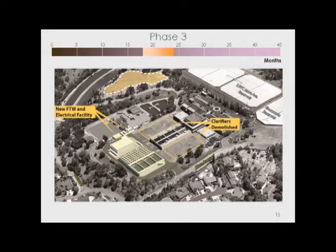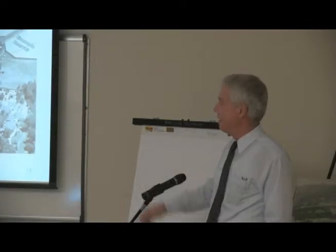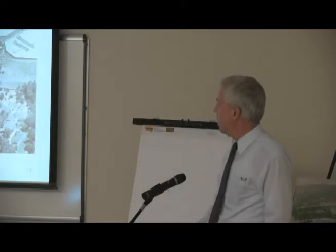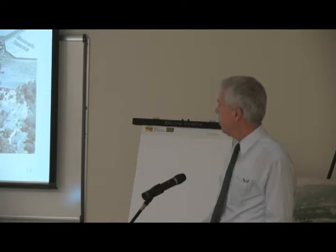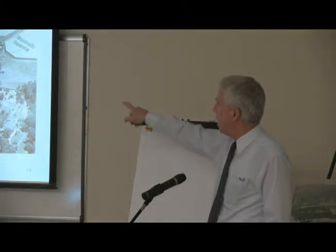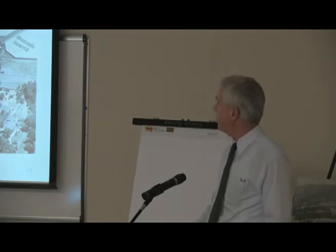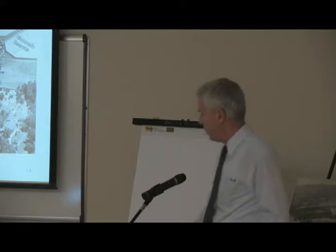So now we've got the new ozone contactor and the flock sed basins built, so we can take the clarifiers offline. And taking them offline is not like unplugging them. We're gonna flatten them. They're gonna go away, and they're all built of reinforced concrete, so it's gonna be a pretty big demolition job, you can imagine. And when they're gone, we'll have a flat surface there on both sides that's ready for the next phase of construction, which is the construction of the new filters on this side.